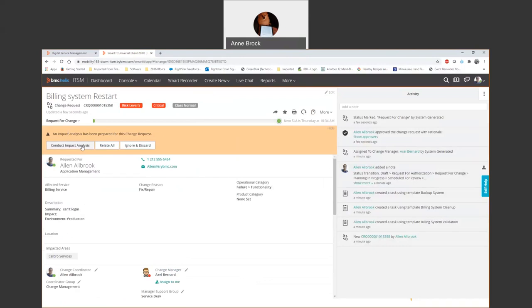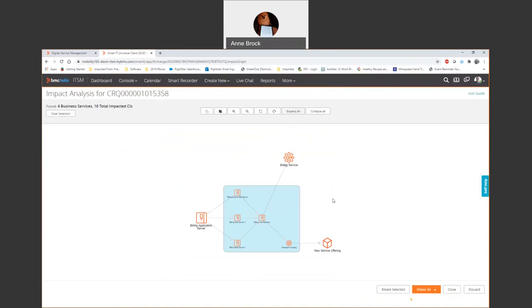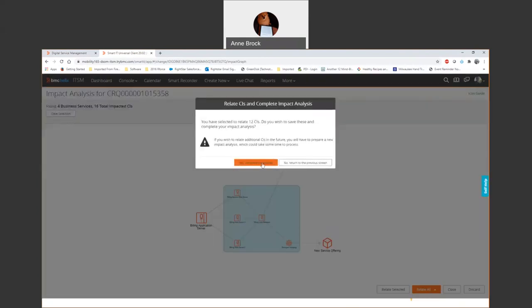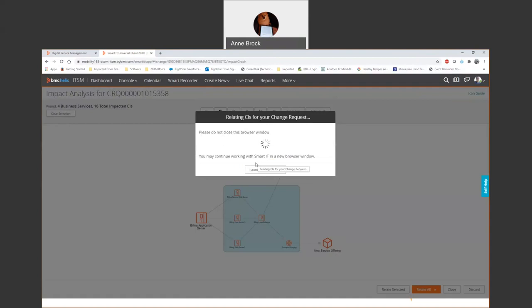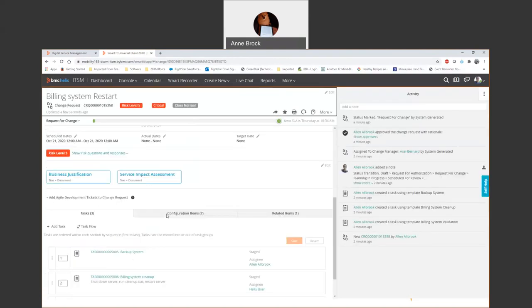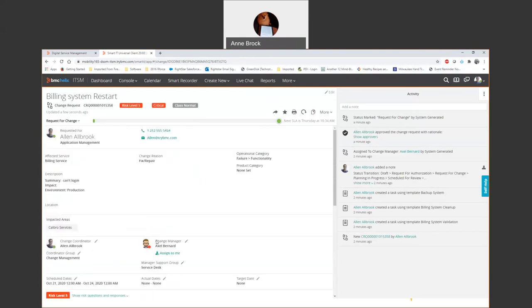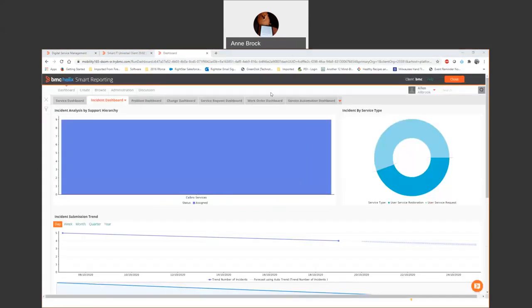Now let's look at this impact analysis. This is what I was talking about. It's based upon the data in my configuration management database. We'll talk about how to get it there in a full demo. I can build impact relationships. I can see when I'm bringing down my application server, restarting it, here's everything I'm impacting, including sonogram imaging, which I may not have known about. My approvers probably would have liked to have known about that before they approved the change. But I'm going to attach all those configuration items now to the change so that we can see everything that is going to be impacted. So a lot of capabilities in here. Again, we're only doing this for a short time today. We're not going to talk too much more about change. Just know it's very robust.